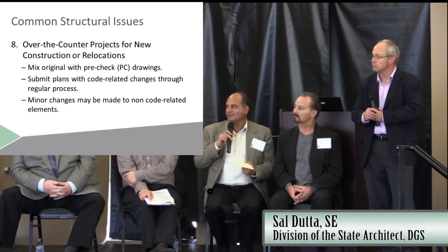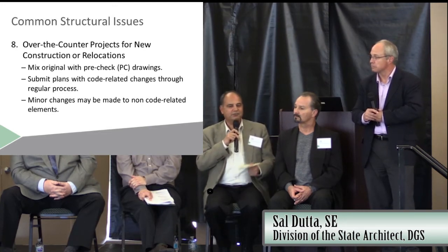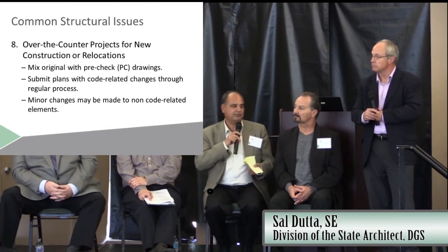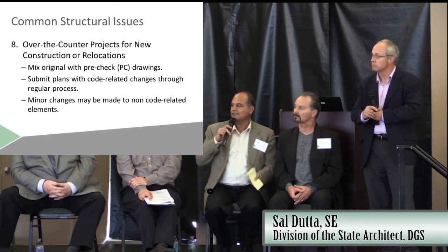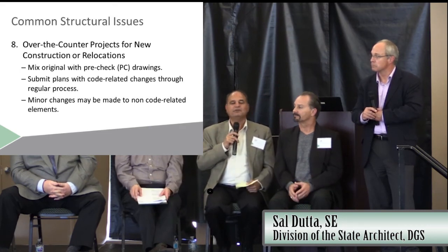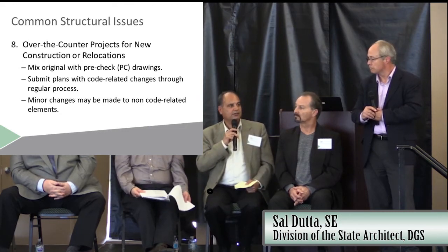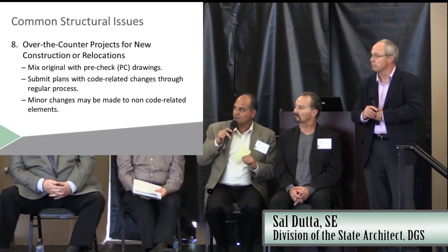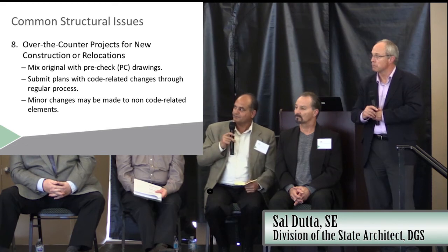But our policy is if you have to review calculations, unless it's a very minor calculation, one or two pages, we don't want to do over-the-counter, it needs to be submitted. With the new process, if you make the appointment, it should go very quickly, but if you want to get it done the same day, and it's very simple, maybe you want to contact me or Gary, who's the other plan check supervisor, and see if he can accommodate you. But most of the time, over-the-counter is only for the PC buildings.